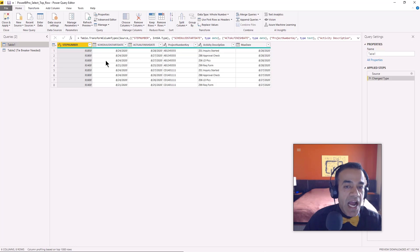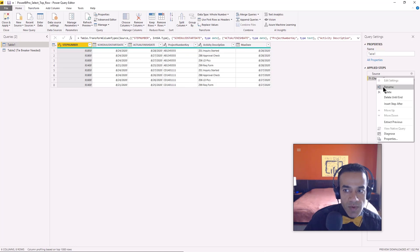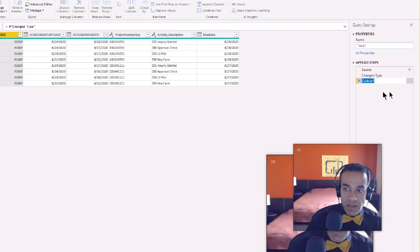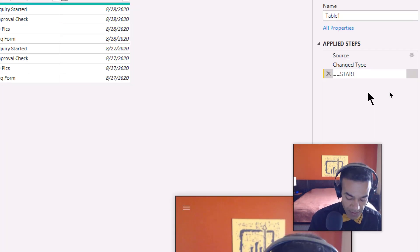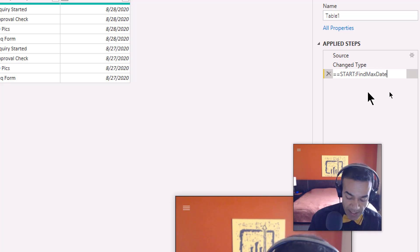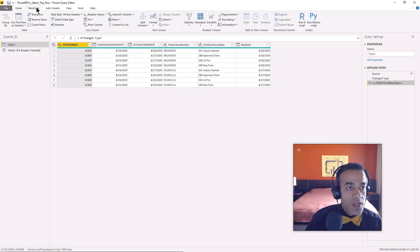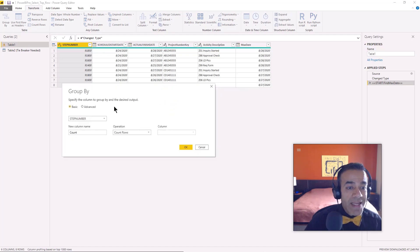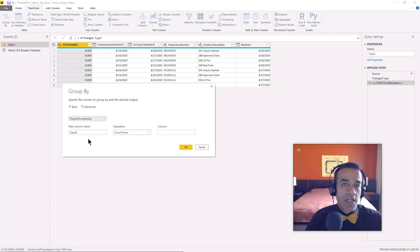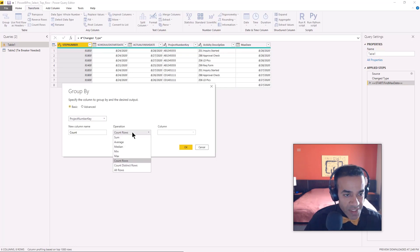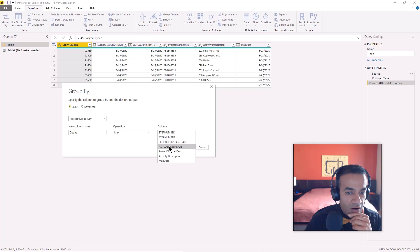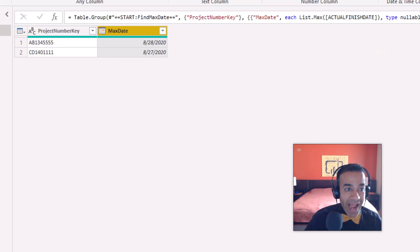So that's the thought process. What I'm going to do is insert a step and rename it 'Find Max Date'. I'll go to Transform and click Group By, grouping by the project number key (the category). Then I'll say: give me the maximum of the actual finish date for each group. Now I have the max date per project.